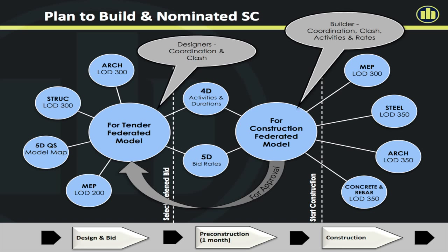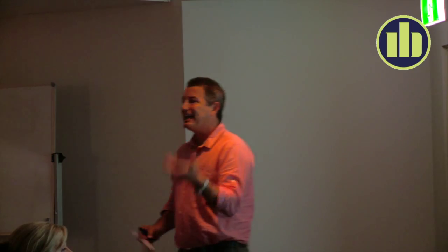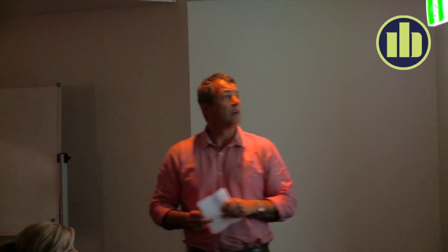but we do the best that we can and then we pass it on. If it's a hard dollar type approach, which we know 64% of projects are, then it's up to the contractor. So we pick our preferred bidder and then have the contractor do some work. He engages his subcontractors in that, in terms of the work that he needs to do. It's about coordination again. It's about clashing that job again, because what he sees is something that's very different to what the designers see. It's different perspectives. Once he starts attaching activities and rates to this, he starts to understand what that job's really about.